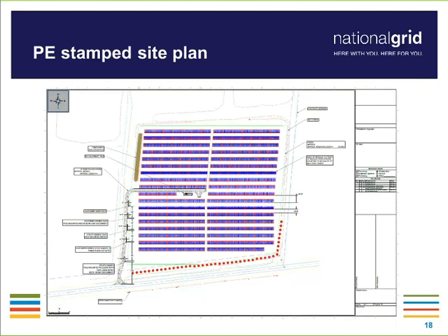So the engineer of record is going to stamp and seal this one. That authenticates that design as the design intended to move into construction, and then we have everything basically kind of soft cast into concrete,